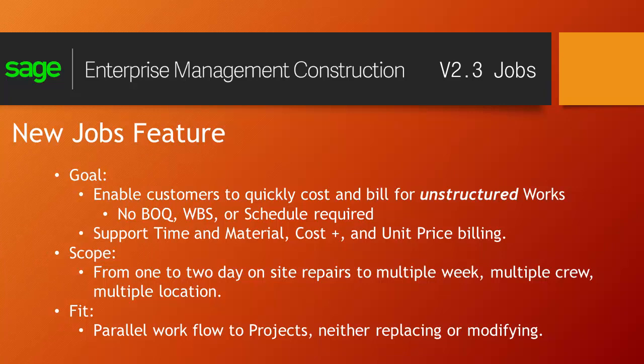Rather, they were going to bill directly based on time and material or cost plus with a negotiated price list, or fixed unit price billing where they're billing per foot of wall repaired or per cubic meter of concrete poured or what have you. So the goal here was to provide the simplest interface possible in order to support this kind of job. So I don't want you to think about this as, well, this fits into projects, because it doesn't. It's a completely different workflow to the existing project structure.